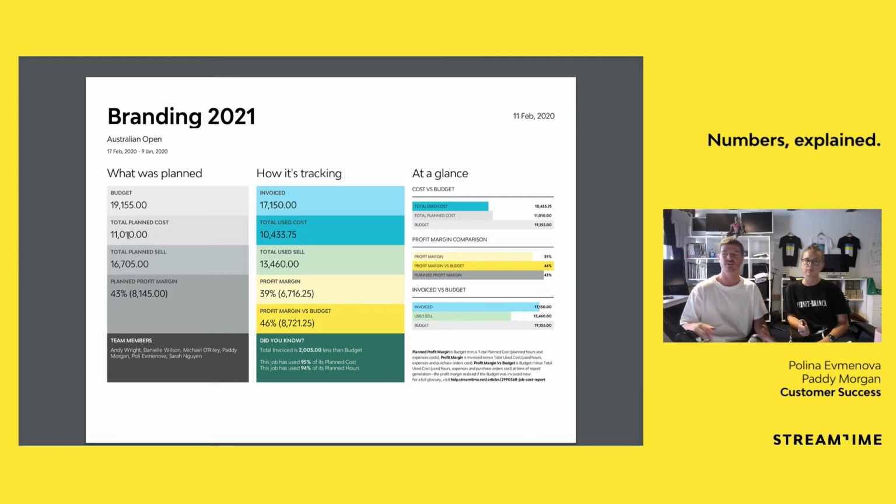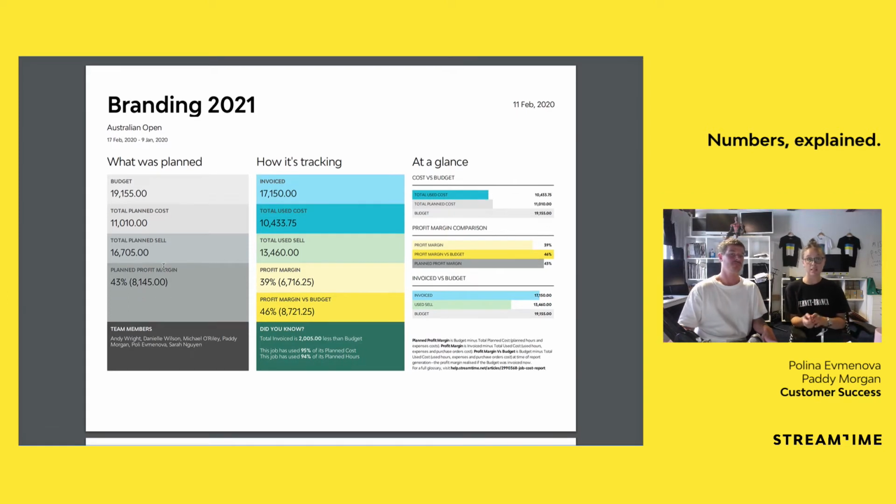It's an estimation. Yeah. Obviously, it's ambiguous at the start, but we want a rough ballpark idea for how much this might cost us. And of course, we're including expenses in this figure too. So third-party costs, whether it's contractors, freelancers, or printers that we're using, we can account for those in here as well once we add them to the job. Yeah, for sure. Once again, if you wanted to see how you've planned a job, if you've planned a profitable job, it's essential to add your expenses and your team members under those items so we can then calculate and predict that total planned costs.